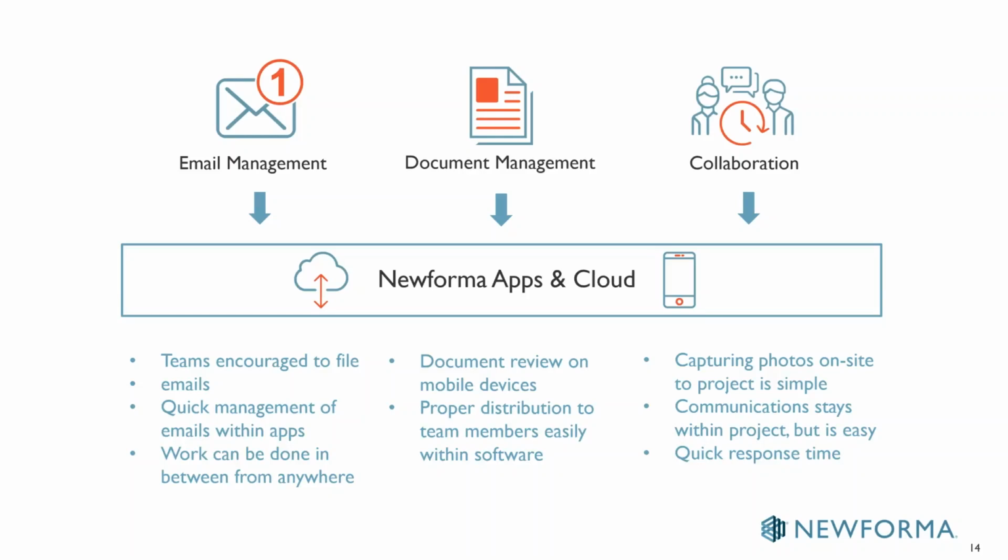I've been on a site in the last year or so where there was a query around some of the M&E drawings. And the action normally would have been, we'll all go back to the office, we'll all talk about it in half a week's time, and we may or may not resolve that problem. I was able to bring up the contract, go straight to the contract drawings, and we identified the key issue we were all talking about, and we all resolved the problem there and then. You know, and again, that saves so much time and aggravation down the line.